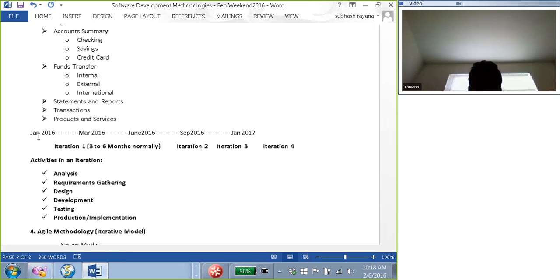But however, if these changes are critical, what happens is they will hire additional manpower, be it technical or testing team, whoever is required, and they'll analyze the changes, analyze the impact of the changes, and they'll hire the manpower, and then they'll get it done within the same iteration. Or if it can be deferred to the next iteration, then they'll plan another iteration and keep going.